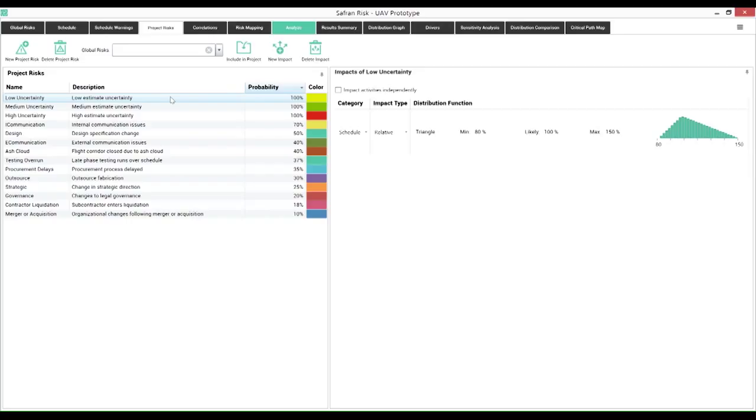There's no longer uncertainty on the activities and the schedule, right? We've introduced something which we believe is far more powerful, which is the ability to capture multiple levels of uncertainty in the risk register and model those alongside the risk events. So there's no more concern about, did I capture this risk? Did I model that as uncertainty, or did I pull that out of the uncertainty and model that as a risk event? I've seen too many project teams struggle with that and get lost and not really have confidence in their assessment the way they've built up the model. So what we've done here is brought it all into one.